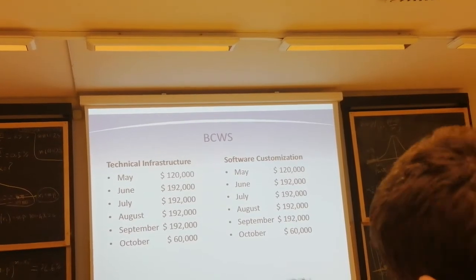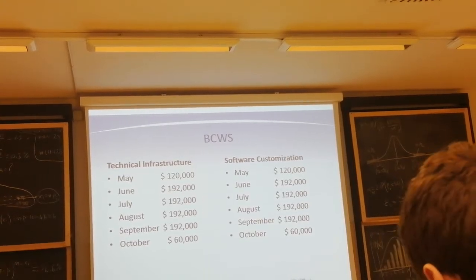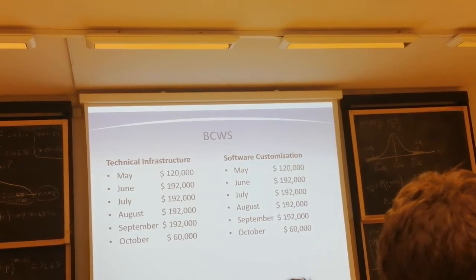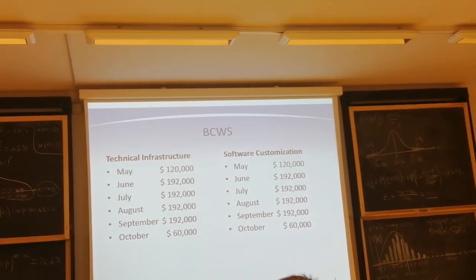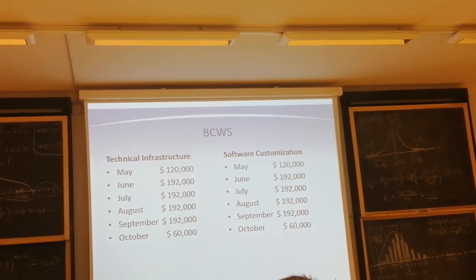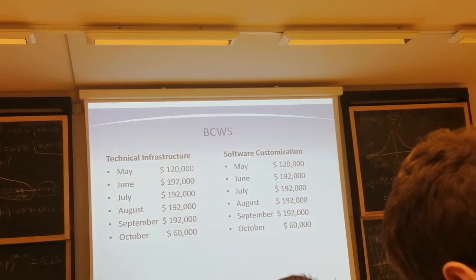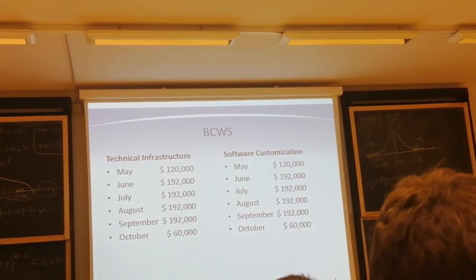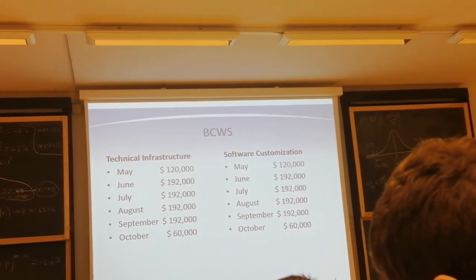You see it's a dollar amount, so probably this is about cost. But cost what? B cost. Budgeted cost. It's the cost that you have budgeted in the cost breakdown structure before you start a project. So it's the budgeted cost. And what's WS? Work scheduled. BCWS is the budgeted cost of work scheduled.